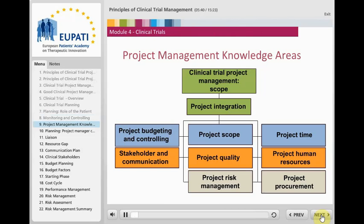Clinical project management consists of many elements that need to be integrated by the project manager. Project scope management is the most important at the start. It is essential to have a good definition of what exactly the project is in order to prepare the plan and start considering the requirements. Once the trial is defined, plans can be made regarding where to perform the trial, required resources — both internal human resource management and external procurement management — timelines and budget. Equally important is that areas of risk in the trial are identified early on and that an alternative plan is worked out for all critical steps, also known as project risk management.